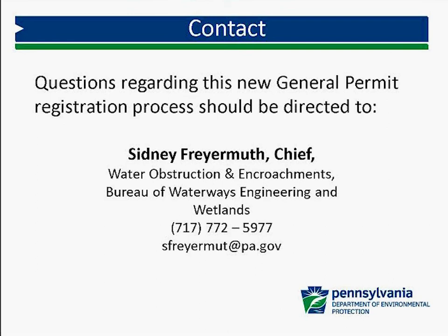Does the new 60-day window for technical deficiencies mean that an applicant must be authorized or denied within 60 days at the beginning of the technical review? Okay, first of all, keep in mind that other than GP 11, there isn't a technical review. It's an eligibility review, which is combined with completeness. So the items that you are submitting with the GP registration to make a complete package will help us determine whether you're eligible for GP coverage.